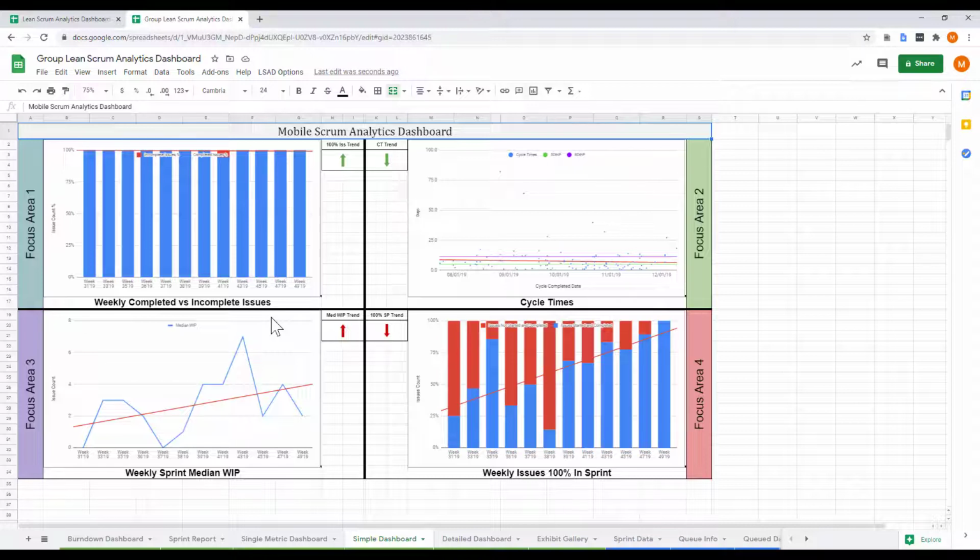Now, when you're looking at these, obviously, we're looking at things like percentages and trends because those still apply. You wouldn't want to, for instance, try to compare teams' velocity. It's not applicable. So not all the metrics are going to apply, but when you're using trends and you're using percentages, they absolutely can apply. So, for instance, how is my group, my department, whatever your organization happens to be, how is it doing at an aggregate level with all the teams that I have in it versus individual teams?